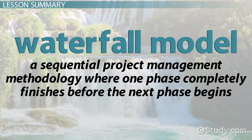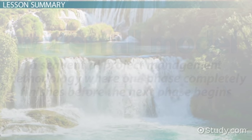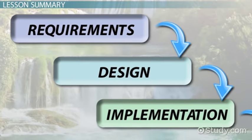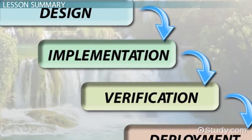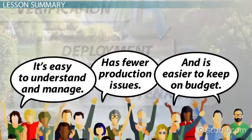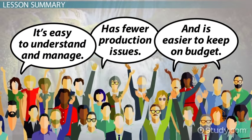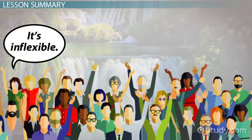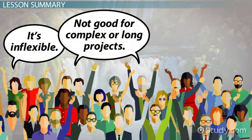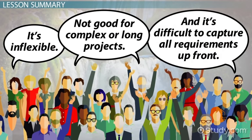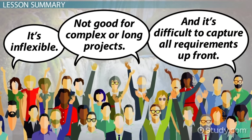The waterfall model is a sequential project management methodology where one phase completely finishes before the next phase begins. There are six phases in a simple waterfall model: requirements, design, implementation, verification, deployment, and maintenance. The waterfall method is easy to understand and manage, results in fewer production issues, and is easier to keep on budget. The disadvantages, however, are that it is inflexible, not suitable for complex or long-term projects, and it can be difficult to capture all requirements up front.